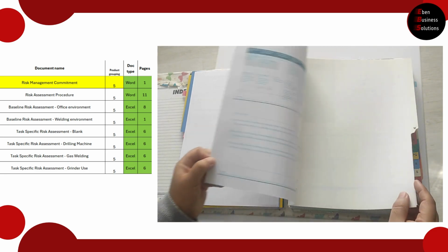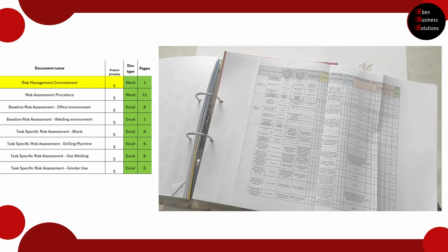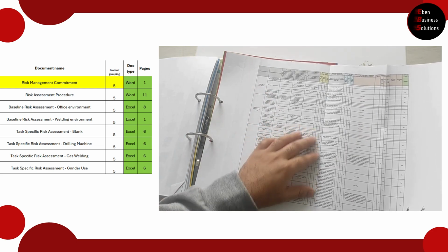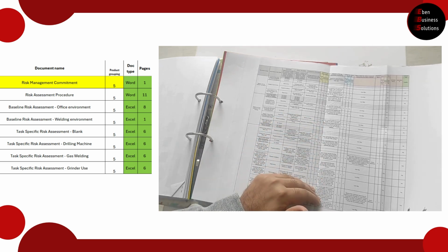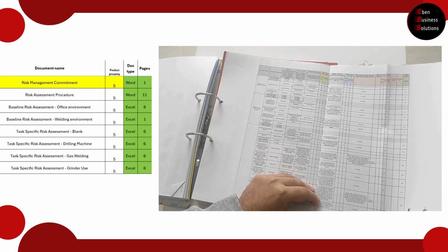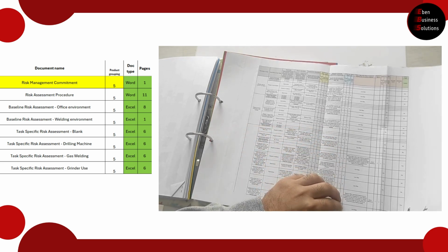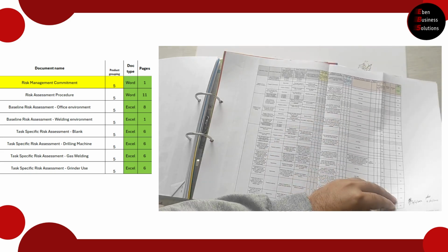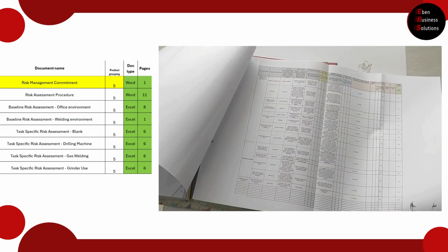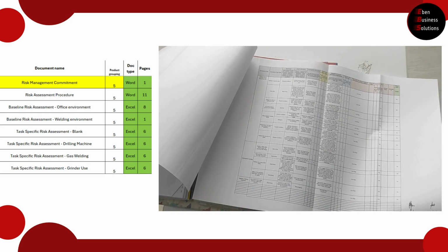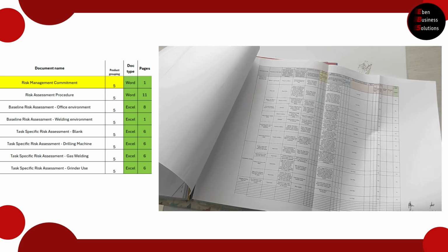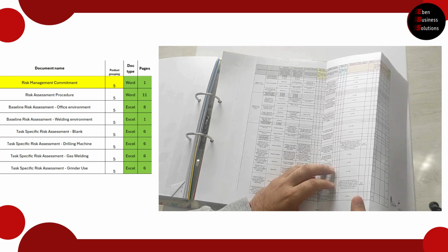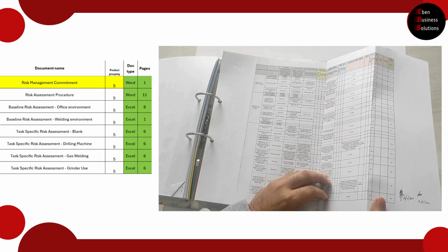Here's a bit of some studies on it. This is an example of an office environment where you have the different tasks, the hazard types, the inherent risk rating, and if you put forth mitigation on the risks, this is now the residual, as in the risk has now reduced, and then who takes responsibility. So you'd develop it as a group and then formalize it and sign it off, and keep reminding the team members to follow the preventative measures to prevent risks.